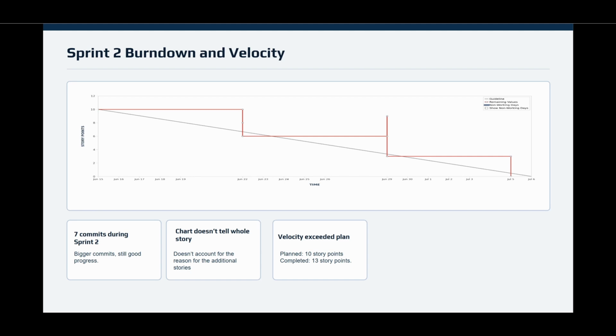Going forward, I plan to adjust sprint capacity from 10 points to 11 points to better reflect velocity so far, and I'm going to update the JIRA by shifting items between Sprint 3 and Sprint 4 to align with the new capacity, while continuing to evaluate whether this adjustment remains realistic before Sprint 4 begins. Overall, the project is in a good state, and Sprint 4 still contains a significant buffer currently allocated to stretch goal work.